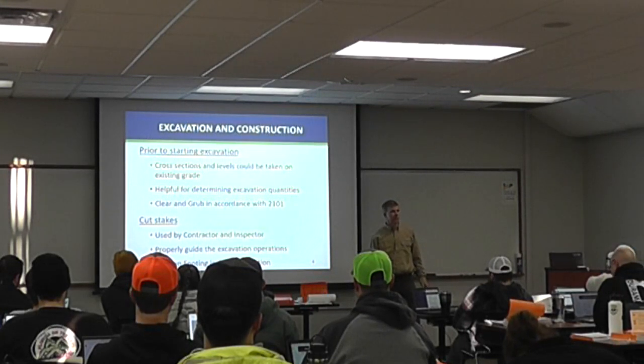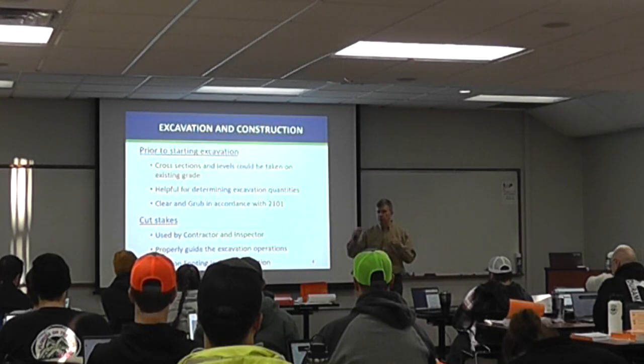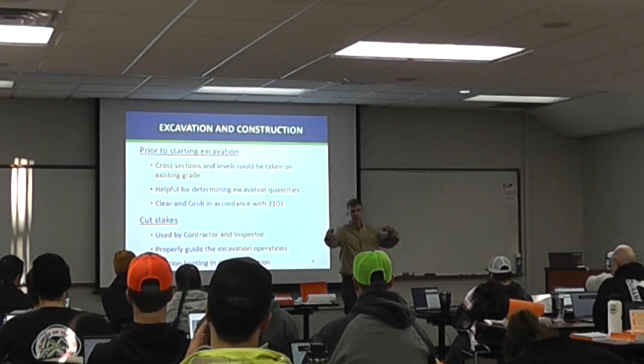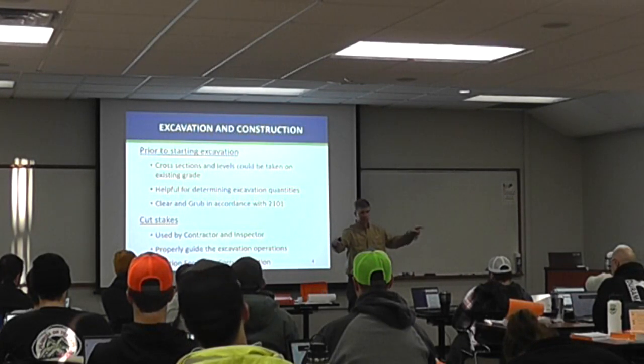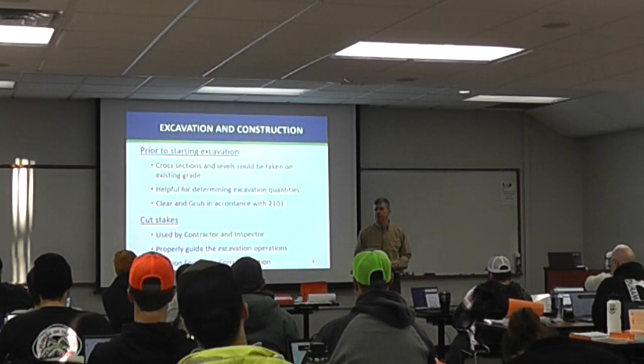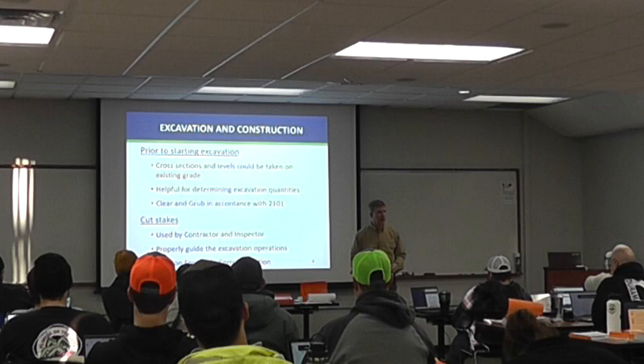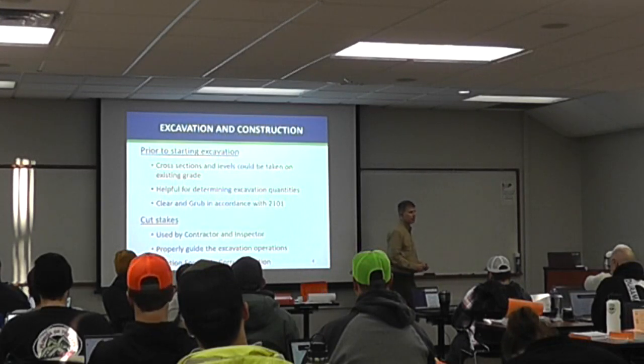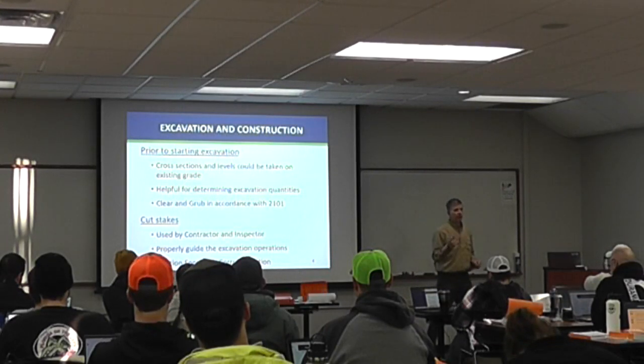Not so quick. There were some environmental requirements that we had to save trees from the river to I forget, 50 feet or something. So there was a number of trees that we had to save, and I'm just really glad that we had a meeting before the guys on the bulldozers got going. So be aware of that.